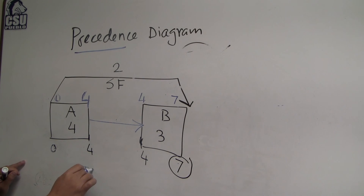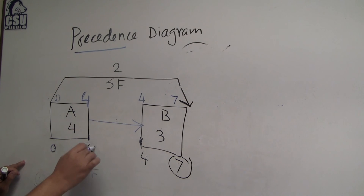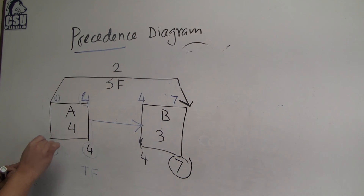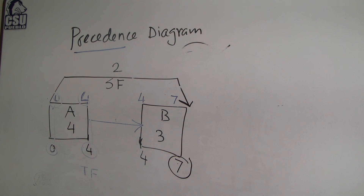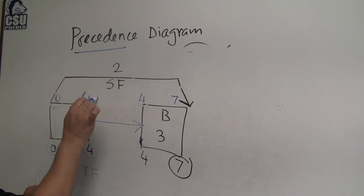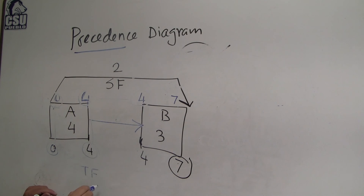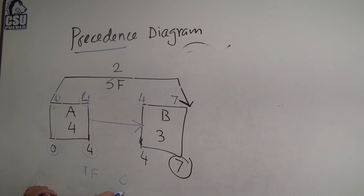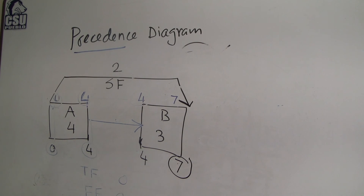Regarding float: total float is late start minus early start, or late finish minus early finish. Free float is the early start of the successor minus the early finish of the activity. So total float here is zero, and free float is also zero.